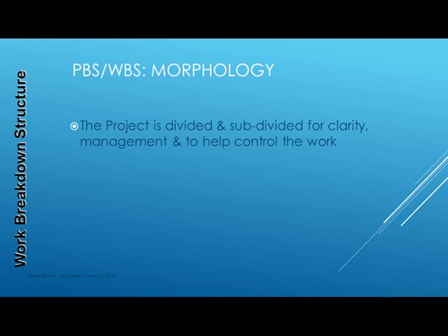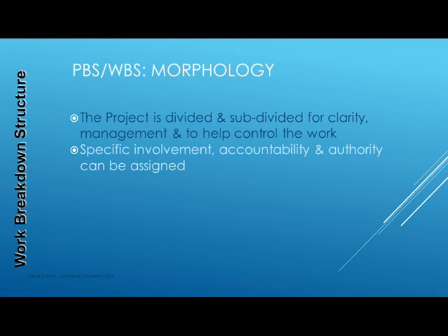This subdivision of the project into tasks allows management to define effective and efficient monitoring and control of the work through to project delivery. Also, each task can be allocated or delegated to others within the project organisation. Sometimes specific tasks are subcontracted to another part of the organisation or a different company. In these cases, formal contracts and/or agreements will be established. It is wise to expect visibility of detailed plans for these delegated tasks in order to achieve effective management.